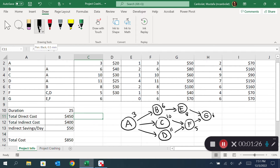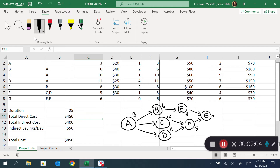The key idea here is that to find the project duration, I realize that from the beginning to the end there are three paths. One of them is A-B-E-G, the other is A-C-F-G, and A-D-F-G is the third one. Each path requires its activities to follow in sequence.